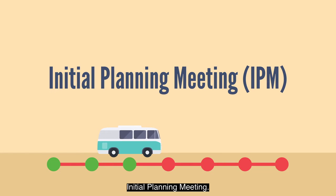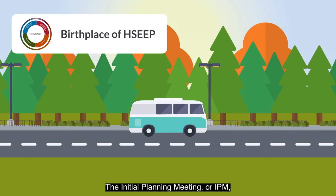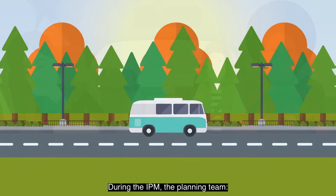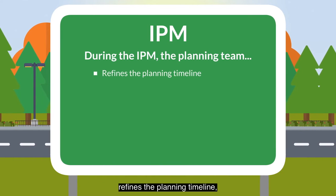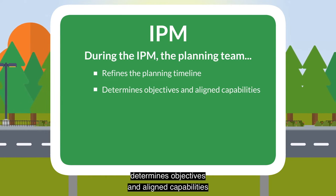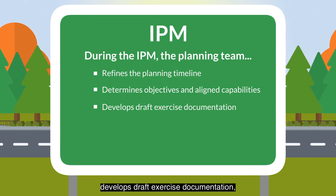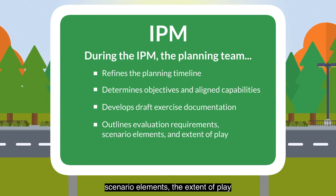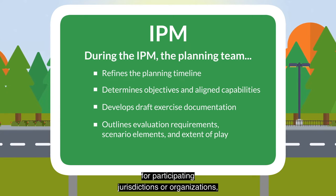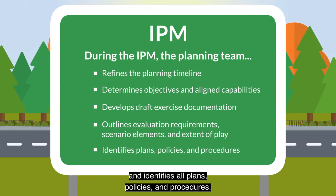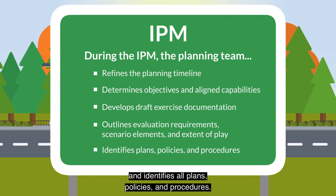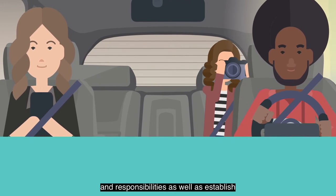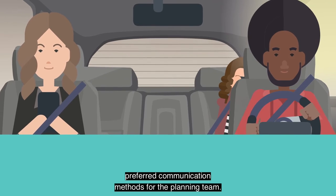The initial planning meeting, or IPM, focuses on refining the scope and objectives for the exercise. During the IPM, the planning team refines the planning timeline, determines objectives and aligned capabilities, develops draft exercise documentation, outlines evaluation requirements, scenario elements, the extent of play for participating jurisdictions or organizations, and identifies all plans, policies, and procedures. The IPM is an ideal time to clearly define roles and responsibilities, as well as establish preferred communication methods for the planning team.